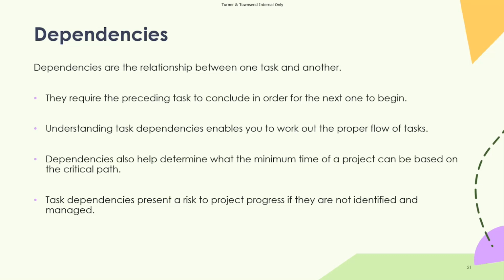So for example, you might have a program in a neighborhood, in a conservation area or area of outstanding natural beauty. Within that, one of the dependencies is being able to get the planning permissions done. So if you know you're going to spend a long time doing planning permissions, you might need to make sure that happens early in the program to allow for enough time in delivery.